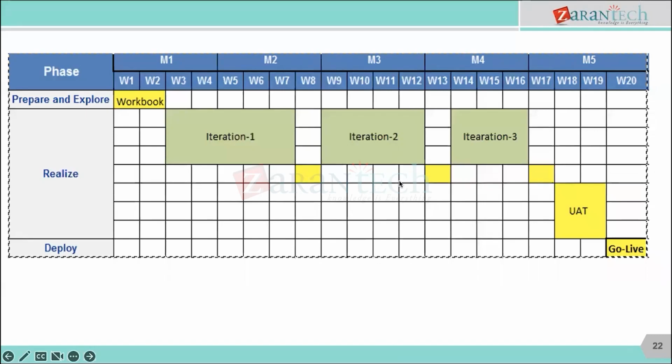Okay. And when we are going for the second round, third round of walkthroughs, guys, the changes that we accept will reduce. Here we can accept a lot of changes, but in the second round of walkthrough, I'll not accept scratch level, complete design level changes. Here any additional custom fields, change of workflows, any validations to be added, I can take. At the third iteration level, I'll accept only cosmetic things, any label change, any sequence or alignment on the screen, such kind of changes, very cosmetic things will be allowed at the last level.